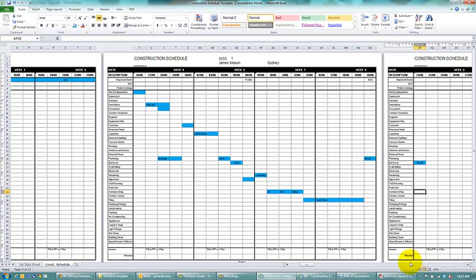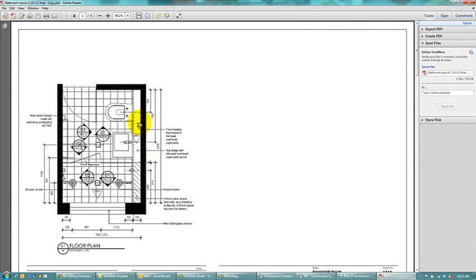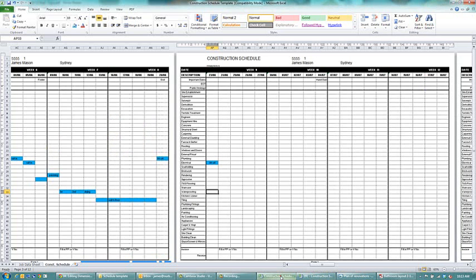Okay. So what do we got next? So we've had our plumber and electrician fit off all their items in here. Next thing probably would be for the shower screen installer to put his shower screen in, and also for the joiner to put in his cabinetry here as well. Alright, so let's come down here, find the glass screen mirrors, put in a day for our guy there.